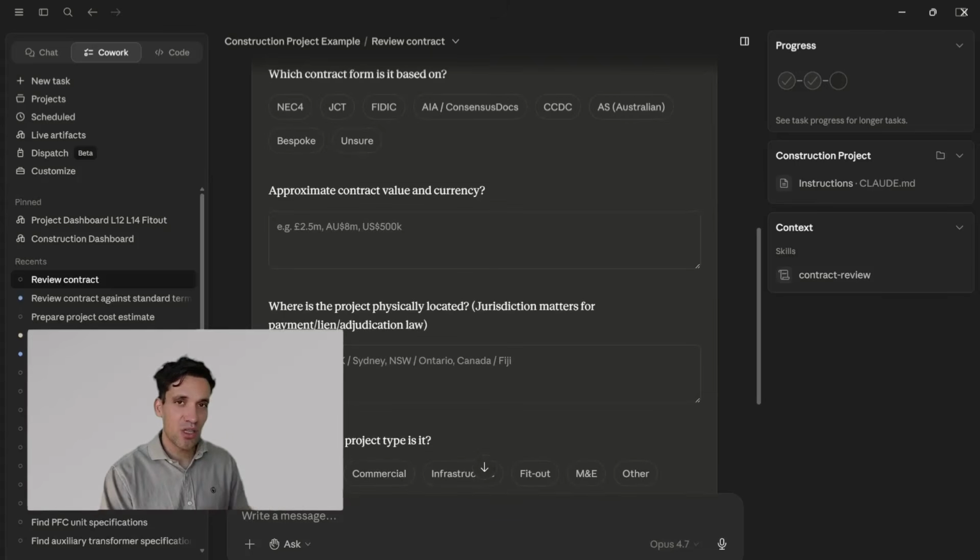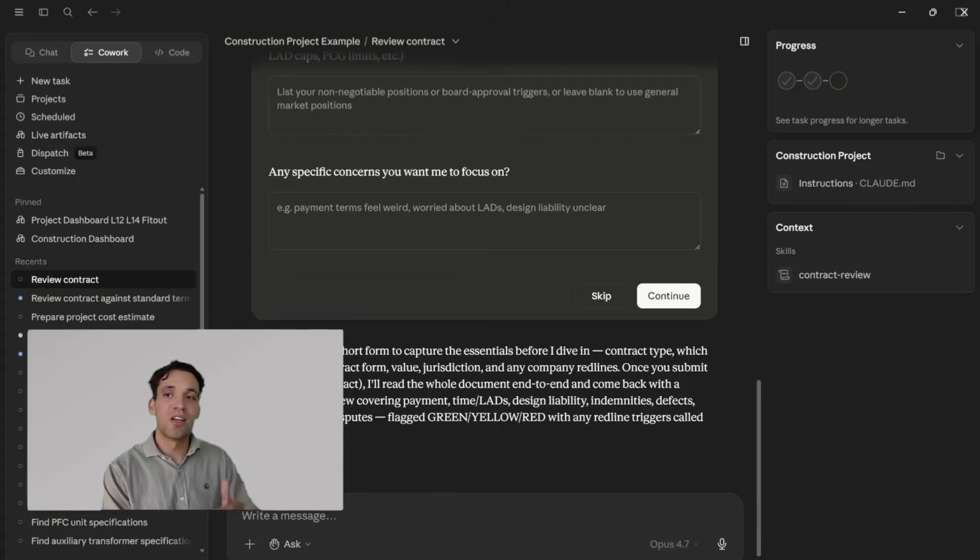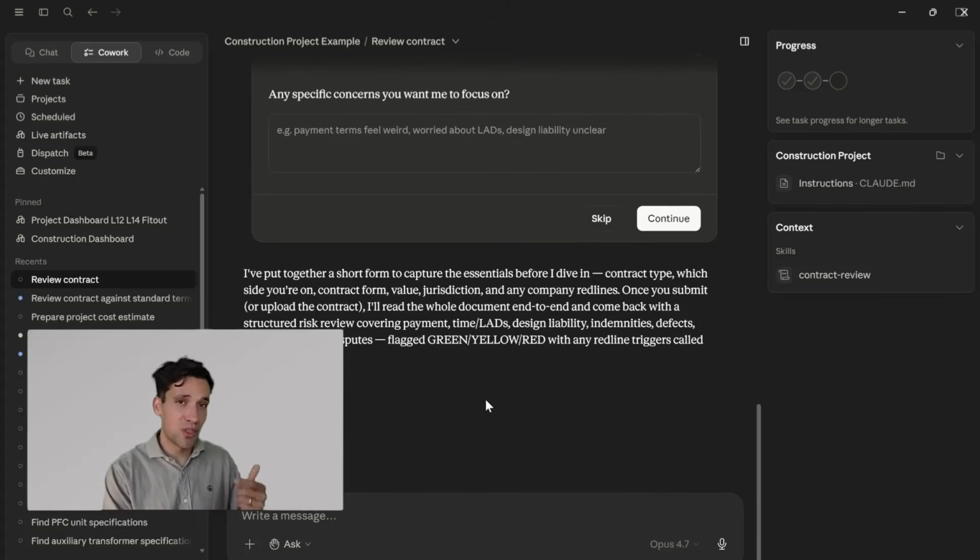Then there are some data transformation tasks. So for example, reviewing a contract, look at all the standard contract terms in the contract. For example, what are the payment terms? Compare it to my standard terms and conditions, what I would accept for payment terms. So if the contract says 45 days, but I only accept maximum 30 days, then the transformation is that it picks up that the contract says this, my standard term is this, and then outputs this into a departures register with a proposed amendment to the contract.